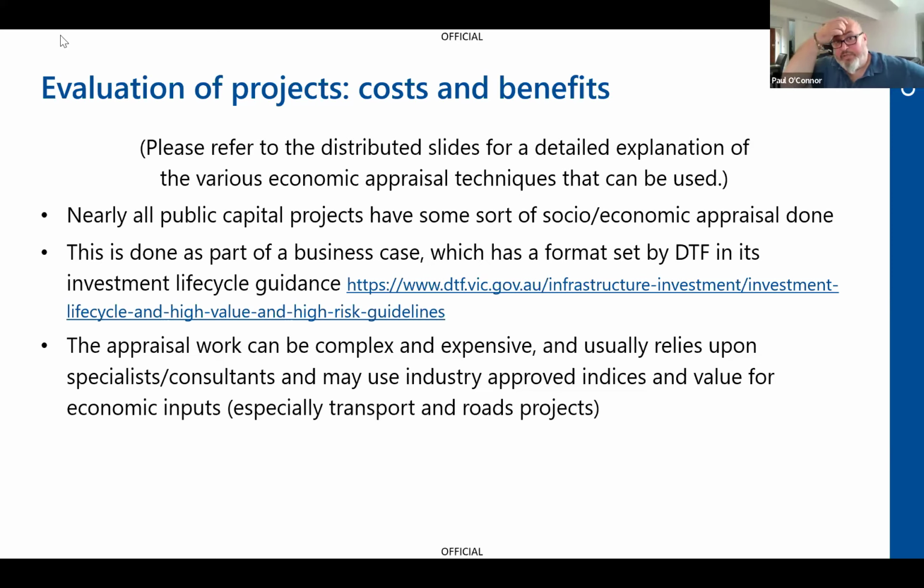And there's a couple of organisations now. I think the Roads Association of Australia now has a bunch of indices. So what we would be looking for is something where you can get indices. We would be asking the department to show us whether they've used them, because they're sort of best practice. And also we'd be looking at how they've used them, because there's also guidance about how to use indices, how to use a particular value and not.